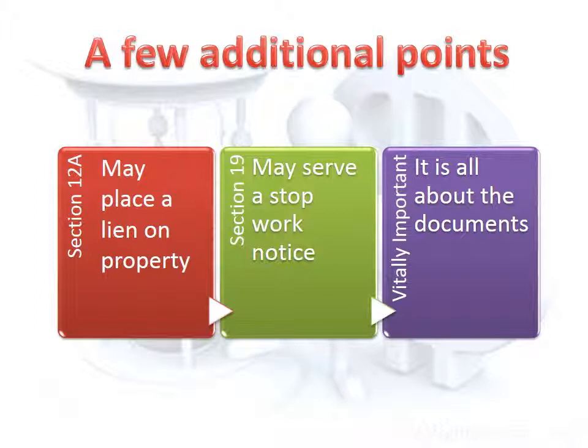Secondly, whilst a contract normally gives you the power to suspend work when a client has breached the contract by not paying, you can also suspend works under the Act. The advantage of suspending works under the Act is that, given it is a legislative right, you cannot be sued